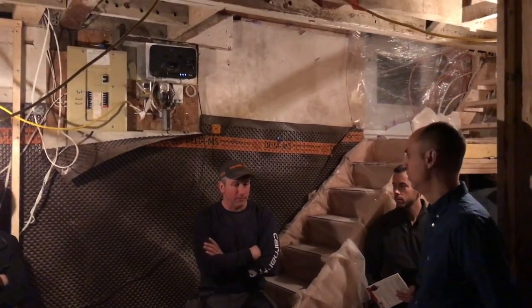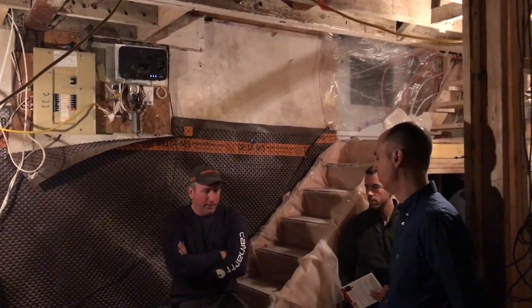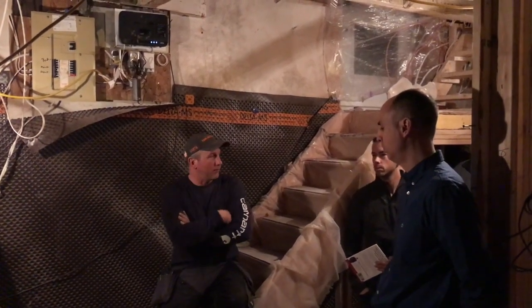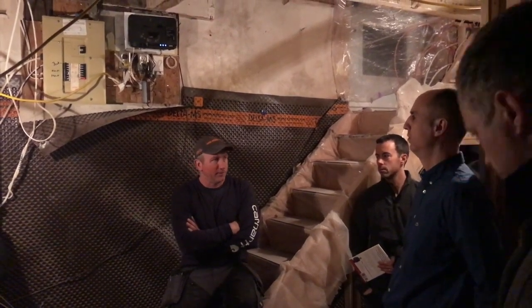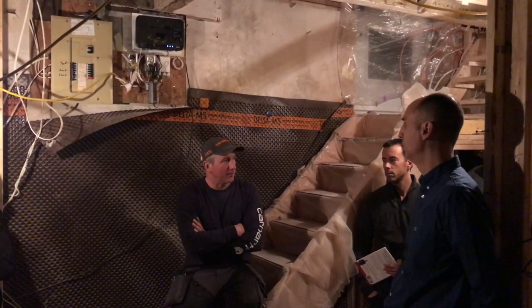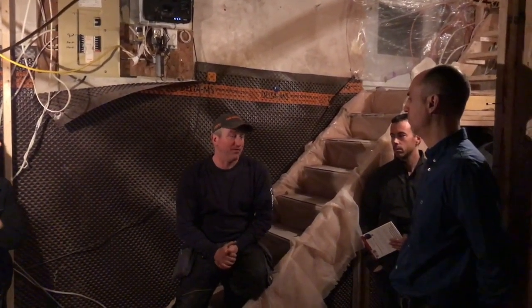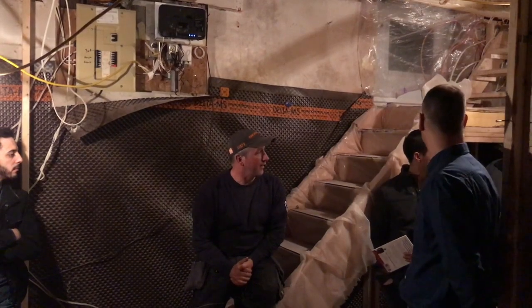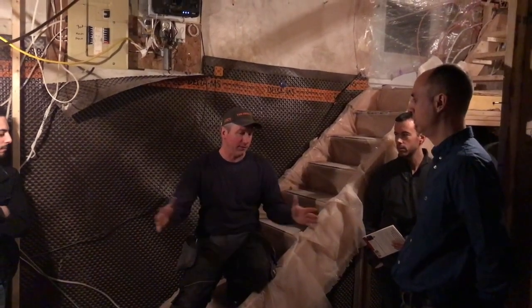It's usually more expensive for the in-floor, because it depends on the square footage. You've got the labor to put all the pipe in, as opposed to several runs, which is a little bit less. Generally speaking, the boiler system is a bit of an upgrade, and the parts around it are quite expensive, all the pumps and everything. Off the cuff, don't quote me, maybe 20 or 30%. That's a really general statement, but it could be controlled by square footage.